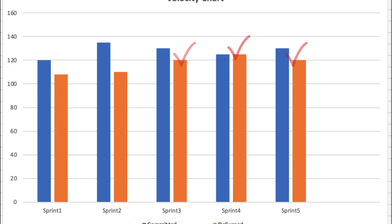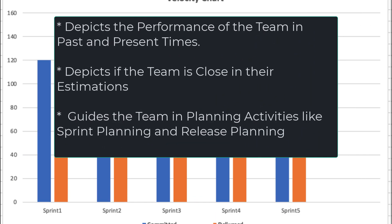Velocity charts are very effective as they depict how the team is performing now and has been performing in the past. They are helpful in observing if the team is estimating correctly and making close assumptions over time — because the assumptions made and the risk assessment capability determine if estimates are correct. Velocity charts also play a vital role in planning. During sprint planning, the team is aware of their velocity — what they can deliver in a sprint — and understands how much work they can pull. Mature teams never pull stories with story points significantly higher than what they have been delivering in the past.